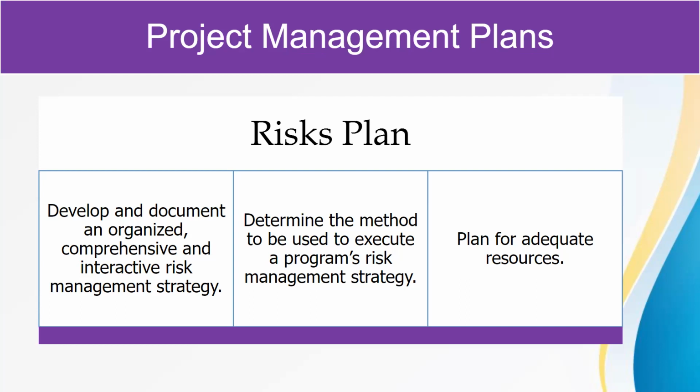After doing all of the categorization of the risks, we do an analysis of them. The risk analysis will be looking at which risk rating is high, which is low, and even the medium level as well. We also will look at the impact of the risk on our project. How does this risk affect our project if it occurs? And then we also look at the probability of a particular risk. Is it possible for this risk to occur? Will this happen? How likely is it for it to happen? What's the probability of this happening?